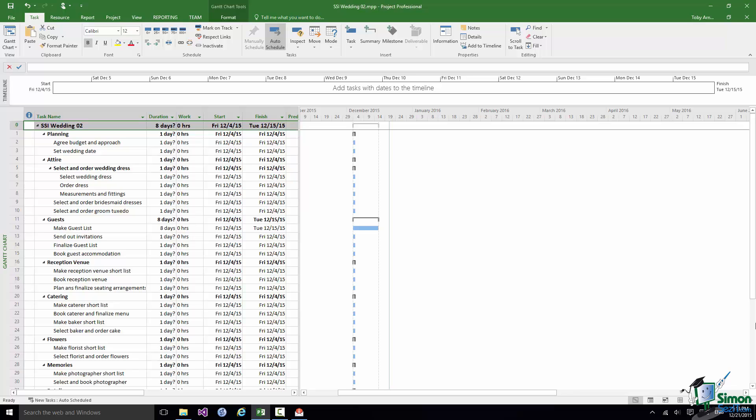Now let's take a pretty straightforward dependency to begin with. Let's look at Tasks 6 and 7, Select Wedding Dress and Order Dress. Now clearly you're not going to order the dress until you've selected it. But as soon as you've selected it you may want to order it.